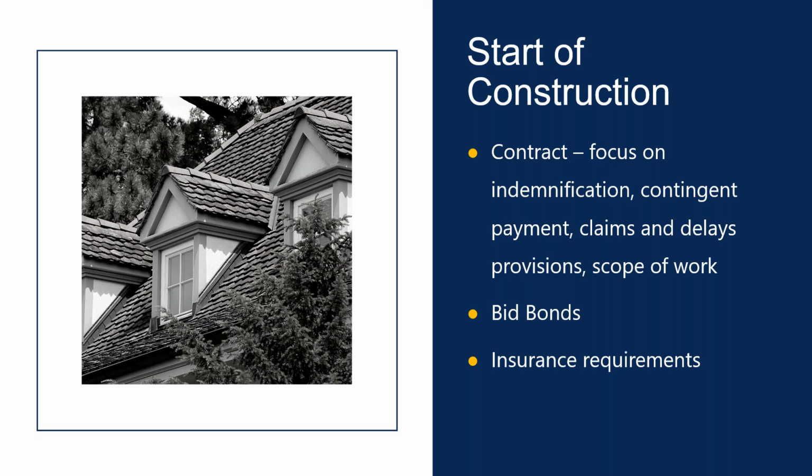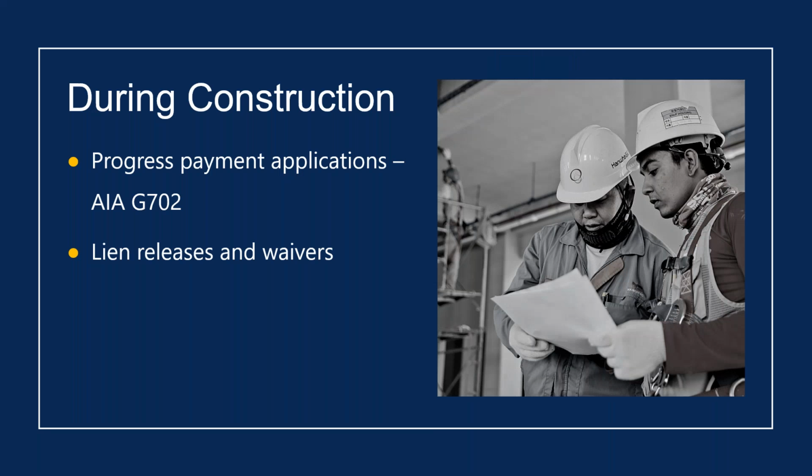Insurance requirements, okay? You definitely want to check any insurance requirements that you have on jobs. A lot of times, if you're dealing with customers, they may require stuff that exceed your coverage. So I always joke around that if you're in roofing, you need a good insurance agent, a good accountant, and a good lawyer to do business. Lean on your agent. Every time you get a contract of significant size, run it by your agent, make sure you got the proper coverage. Watch out for exclusions. Do you have a pollution exclusion? Are you paying attention to what's included in your CGL policy and what's not? That's going to be critical. And it's like everything. It's not a problem until it's a problem, and then it's a big problem.